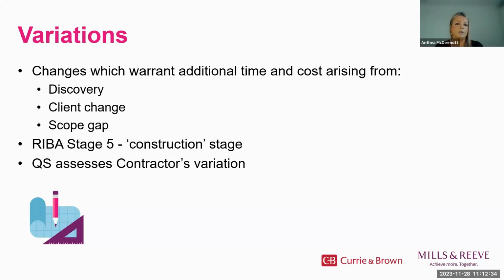Often the cost of construction activities have already been validated through the tender process, so we can rely on the rates already available to us in the contract for works of a similar character. In instances where work is not of a similar character, then it should be valued at fair rates and prices.